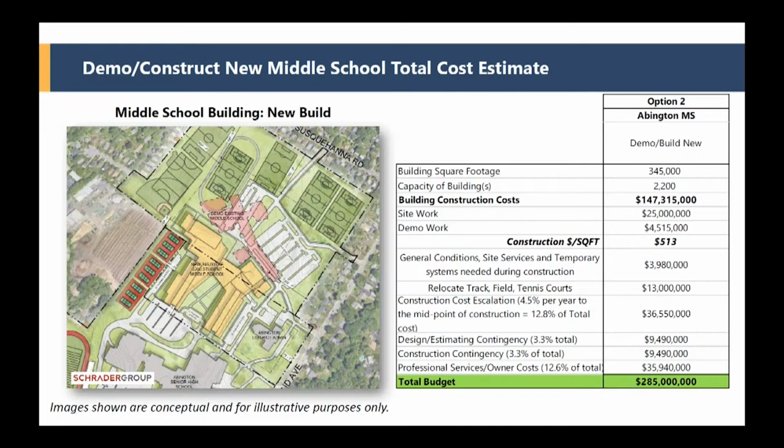David, you want to talk a little bit about this picture? I know that there's a lot that has been said about this conceptual picture, but could you just give an idea of why we did that? Yeah, sure. So now you've got a total square footage for a building that will support the program that you need, and the goal always is to test fit that square footage on a site. The square footage doesn't mean anything in the image. What it's trying to do is get that square footage to fit within all of the setback lines and all of the zoning restrictions on the sites.